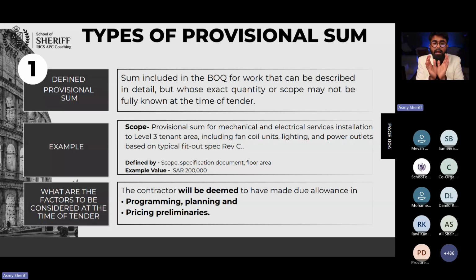So if the client gives you some information, not only do they mention provisional sum, construction of mock-up, they mentioned our mock-up will be 2-story. And our mock-up will be 3,500 square meter in area. Inside our mock-up, we need to have so-and-so requirement. Our mock-up should have 50 car park in front of the mock-up room. So they mentioned some information. From that, the contractor can extract certain information. The bidder can extract certain information, right? Am I right or wrong?